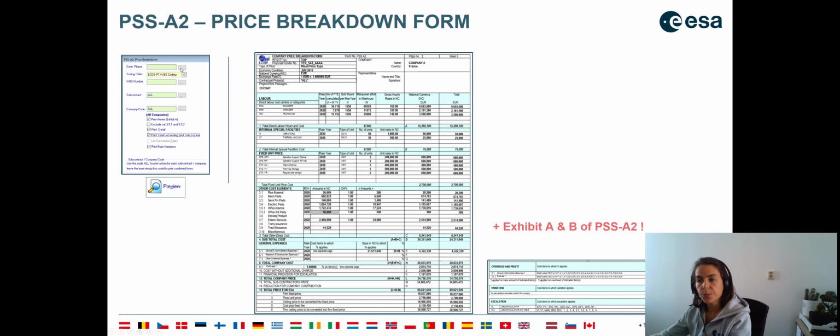You can produce it per contractual phase. So it can be very useful in the case of big procurements, because the ECOS file is so big and the amounts are so big that it can be very useful to have a breakdown per contractual phase to be able to reconcile the price overall and to have also fewer work packages to work on. So you can choose your contractual phase.